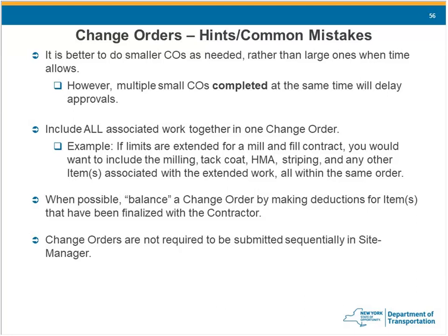If the designer proposed a type 3 end section, but it was determined, because we flattened a slope or something, that hey, we can get a type 2 in here or a type 1 maybe even, if you increase your type 1, you're also on the same change order going to want to decrease your type 3s. So that automatically balances out quantity-wise. We'll save money switching from a type 3 to a type 1 or 2.